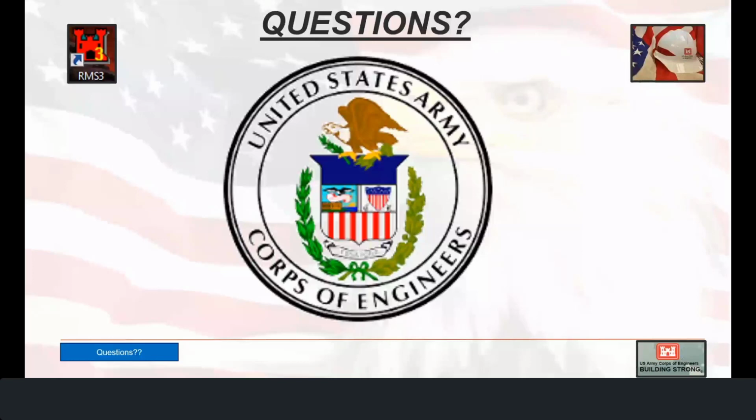And then it looks like we got another question: the slides say the COR and ACO sign. In our office, I process the pay and sign, and the ACO signs. Is that correct? That would really depend upon your office's policy of who's the person with the contractual power to pay and who they've assigned to be the preparer, etc. So I would follow your district policy. That's why they're labeled that way; the preparer doesn't really specify a specific person, just who actually did prepare the work.